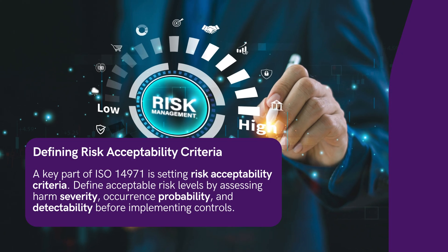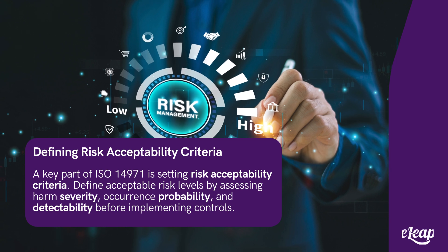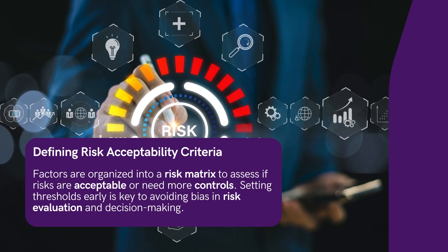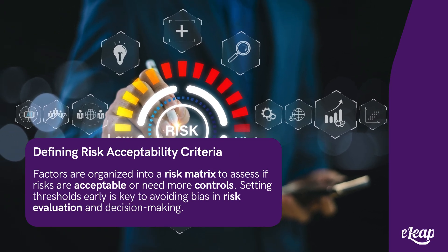One critical aspect of ISO 14971 is defining your risk acceptability criteria. This involves determining the acceptable levels of risk before risk controls are implemented. Typically, you will define the severity of potential harm, the probability of occurrence, and how easily the risk can be detected. These factors are often organized into a risk matrix to help assess whether the risk is acceptable or requires further controls. It's crucial to establish these thresholds early to avoid bias during risk evaluation.